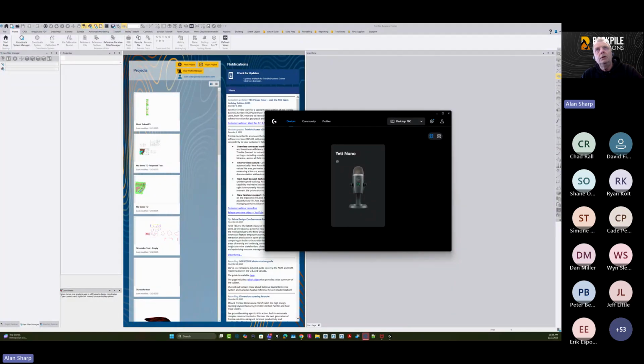Bid to win currently, the interface I know about is a spreadsheet interface where you can just load a spreadsheet and tell it which fields in the spreadsheet are which pay items. In our spreadsheet tool, we've put all the data into the report. You'll see that in a minute or two when we get into the reporting side, so that you can just match the fields. It's in a fixed column format, our data. So you can basically say column 3 is the quantity and column 4 is the units of the quantity, and column 2 is the name or the description of the quantity, so that you can then just map the cells directly.